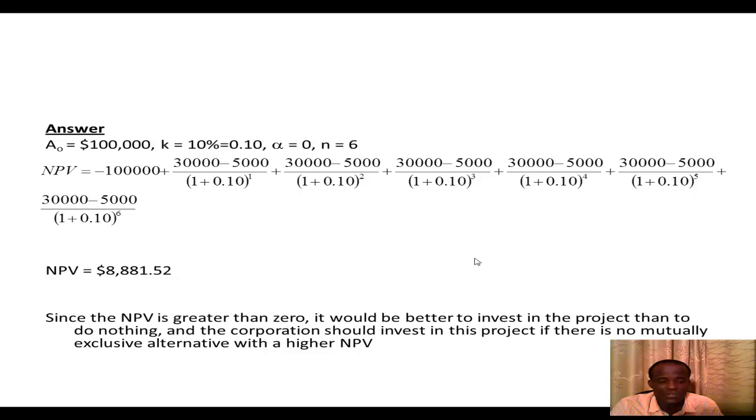And so the corporation should invest in this project, if no mutually exclusive alternative with a higher NPV exists.